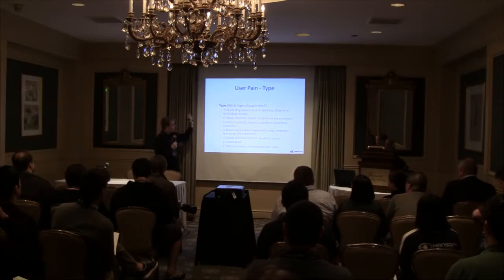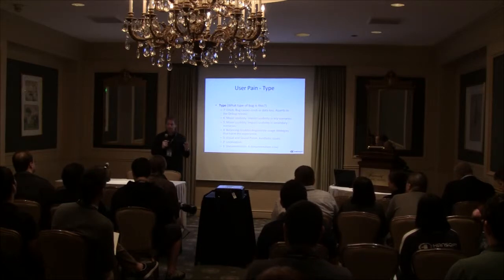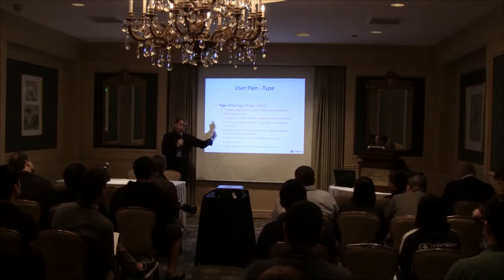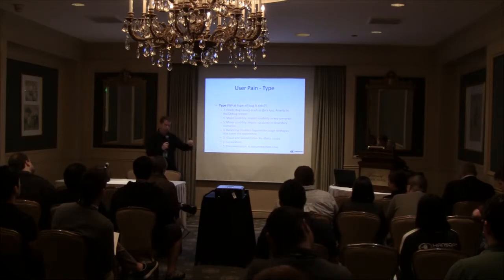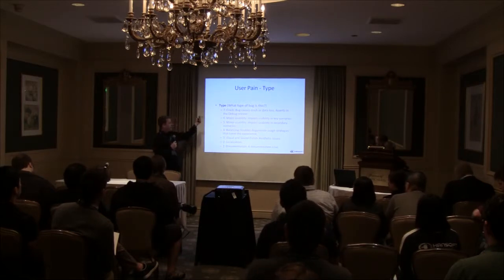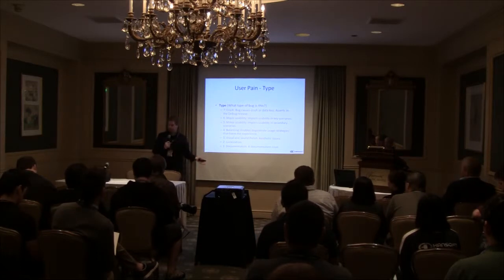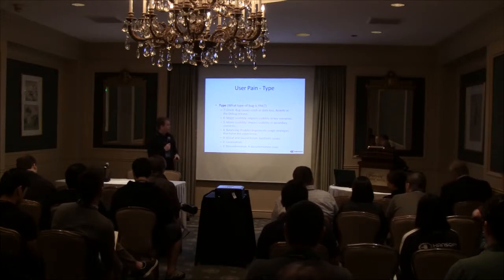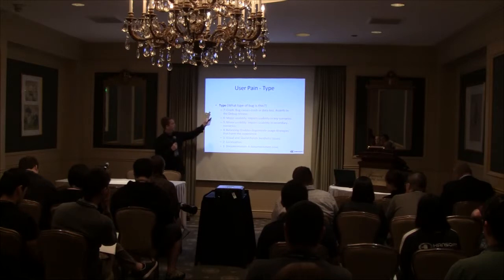So come up with more than one criteria for deciding what a bug priority is, because one sort of criteria is not really a great way to hack down where you need to get to in order to know what is important. So 7, of course, is a crash. It's very rare that you would let a crash go beyond the initial check-in. 6, major usability issues. This is really about this concept of user pain.